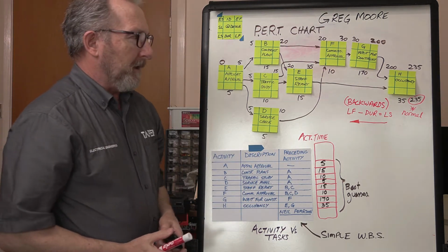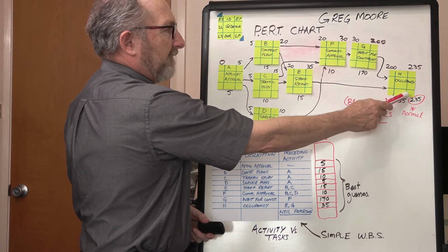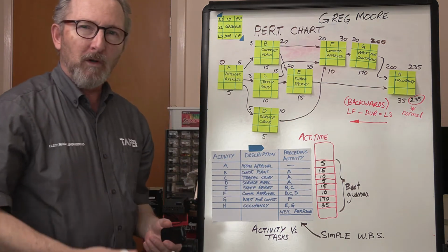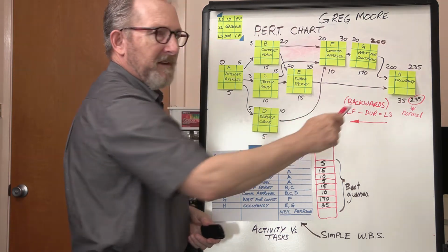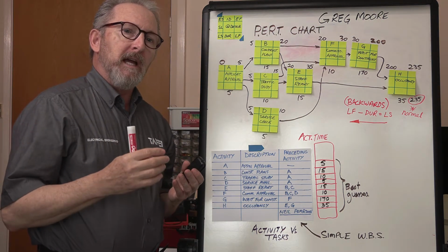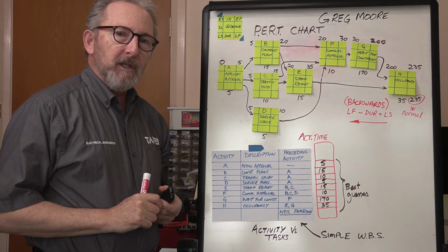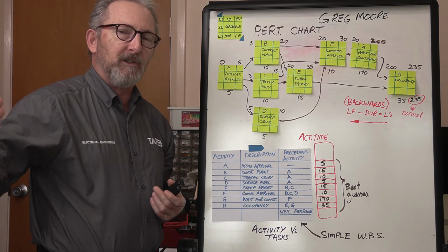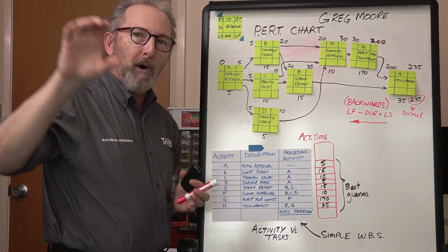Before we go ahead and do that though, I've put 235 as a late finish here, and I put a red circle around it, and I said that's kind of normal that the early finish and the late finish are going to be the same value, but if there were multiple projects happening at once and the overall project manager wanted the late finish time from a different project to tally up with the late finish time here, they might borrow that number.